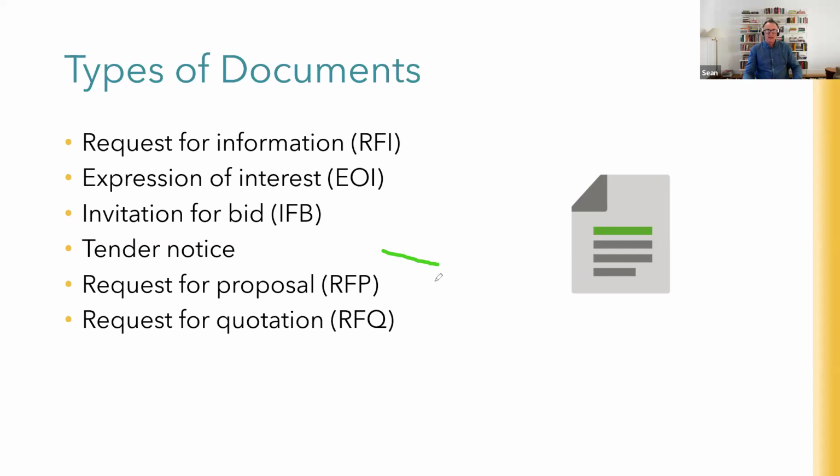So the level of detail you need for these documents is a lot, because nobody's going to give a request for proposal that's accurate or a request for quotation on your loose one paragraph description of your problem or issue. They'll want to see plans and technical specifications in as much detail as possible to be able to give you this.